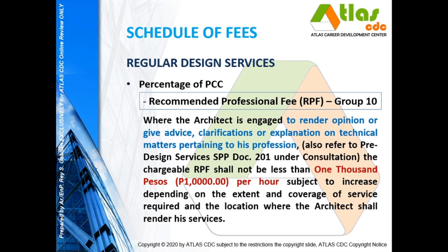Let's go to the last group, which is Group 10. So this is where the architect is engaged to render opinion or give advice, clarifications or explanation on technical matters pertaining to his profession. Now also refer to the pre-design services, SPP Document 201 under consultation. The chargeable RPF shall not be less than 1,000 pesos per hour, subject to increase depending on the extent and coverage of the service required, as well as the location where the architect shall render his services.